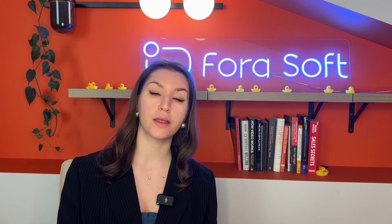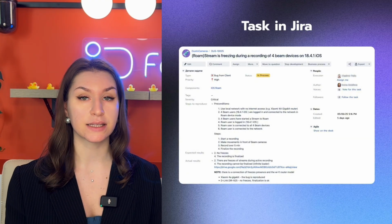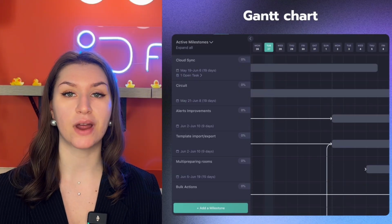After planning, our development team designs your system architecture, which is reviewed and approved by the internal committee. They make sure that everything adheres to our standards. Meanwhile, the entire team breaks down the requirements into detailed tasks in Jira. We identify edge cases and set a clear project timeline with milestones and release dates. We visualize the plan as a Gantt chart and share it with you, so that you could easily track the progress.